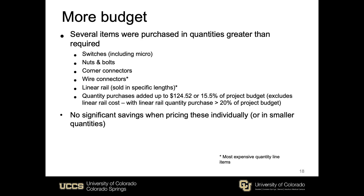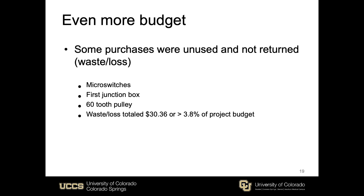Something to note, particularly if we continue to produce these machines, is that more than 20% of our budget was spent purchasing materials in quantities greater than needed for a single machine. Trying to find these materials singly or in smaller quantities did not provide any substantial savings. The wire connectors and linear rail were the most expensive bulk purchases. Also, nearly 4% of our budget was waste — items purchased and not used for BoozeStack that were held past the return window, including a set of micro switches, our first junction box which was slightly too small, and a larger pulley.